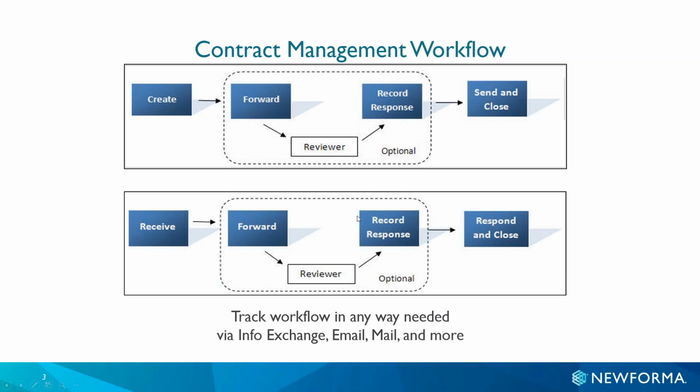Now, just so that everybody is aware, the middle part of the workflow is completely optional. So if there is an email that comes in with a question and I'm the one answering the question, I can go from the receive directly to the respond and close. I don't have to forward it to myself, record my response, and then go to the respond and close. I can also track the workflow in any way needed, whether it's email, info exchange, snail mail, courier, fax, hand delivery. I can do any of those functions within Newforma to track the workflow in that way.